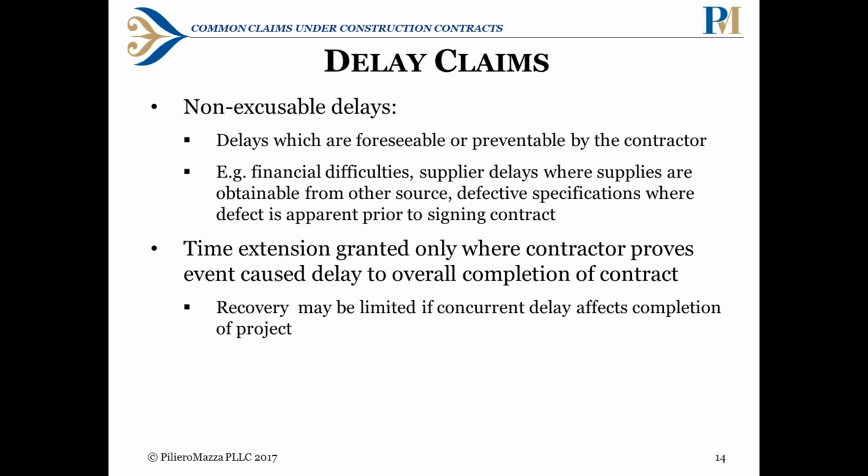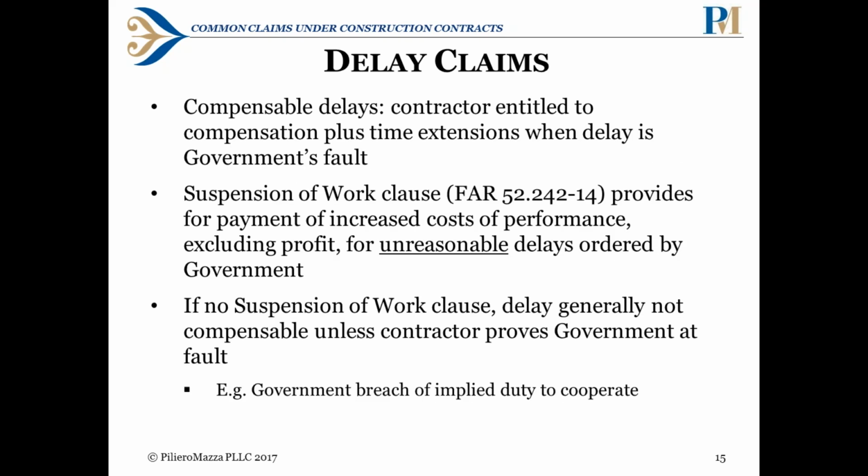And delays can be linked to other claims, like Jackie mentioned, differing site conditions. Those can cause delays, and you would want to be able to show how the differing site condition caused the delay. And that would often be a compensable delay, where the contractor is entitled to compensation plus time extensions because the delay is the government's fault.